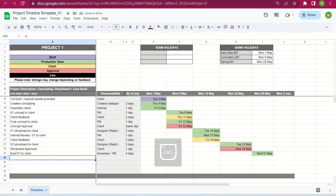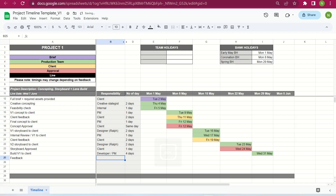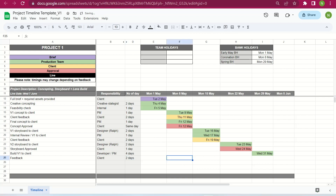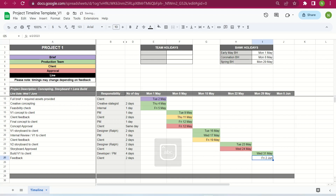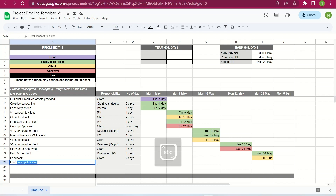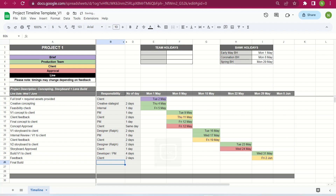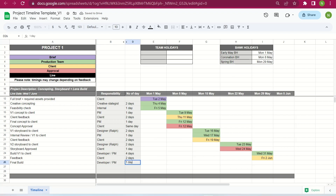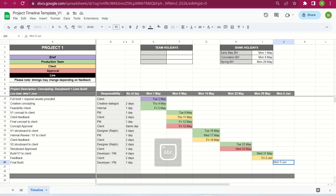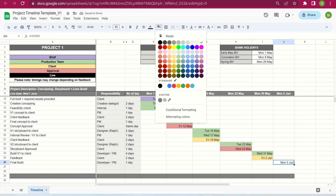After V1 of the build has been sent to the client, they provide feedback. We give them their usual two days, which takes us to Friday the 2nd of June — highlighted yellow. After the client's feedback, it goes back to the developer for the final build. We give them one day, which would be Monday the 5th of June, highlighted green.